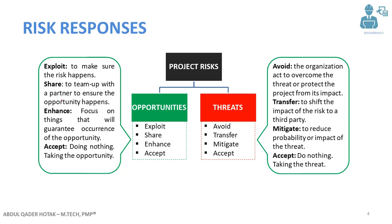Exploit means to make sure that the positive risk — the opportunity — happens. There's something you foresee that could happen which will impact your project positively, so you take actions to make sure that opportunity shows up and you take it. The second one is share: it means to team up with a partner to ensure the opportunity happens.